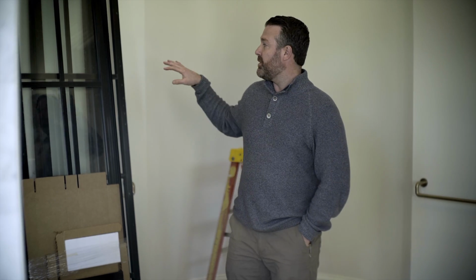One of the things I'm probably most excited about is the shower glass. Back when we first originally designed the house, this is the product that I envisioned going in. I'll admit that I had a little minor freak out moment where the whole thing almost didn't come together. So I scrambled and I called Coastal Shower Doors, who actually makes it. The product's called Gridscape. I pled my case and said, this is the house we're doing. And they pulled some strings for us and literally fabricated these shower doors for us in like 4 weeks. I can't wait to see it. I hope it's gonna look amazing.